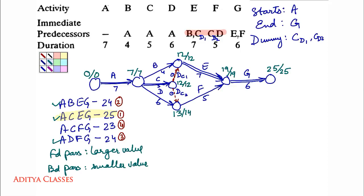Last path is A, C, F, G. Forward pass: 0 plus 7 is 7; 7 plus 5 is 12; 12 plus 0 is 12 — but in forward pass we pick the larger value, so we use 13; 13 plus 5 is 18, and we continue with 19; 19 plus 6 is 25. Backward pass: 25 minus 6 is 19; 19 minus 5 is 14; 14 minus 0 is 14 — but we continue with the existing 12; 12 minus 5 is 7. All paths have been taken care of.